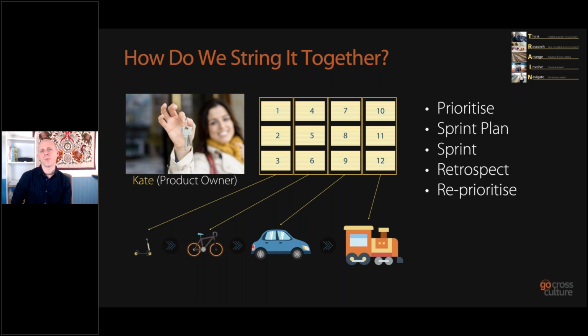And what you can actually do is use statistics of your organization where perhaps waterfall projects have had committed delivery dates in the past, and the number of times that those dates have actually changed and what issues have come up as a result, and say, we are trying this new approach. So this is important before embarking on the actual implementation: get everybody on board up to the higher level of the organization, for this very reason, to say, you may ask for an estimate, we will give you an idea from a project management perspective, because we have to report that up the ladder, but we can't be 100% on those estimates because we're using an Agile process.